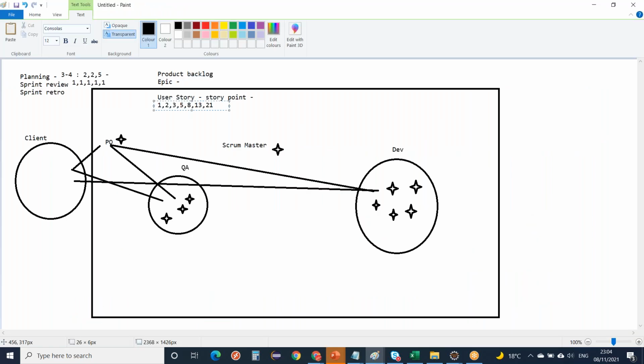That's it. So based on how much work we have with that user story, how complex it is, or how much more work we have, based on that we will be giving the story points. If one or two test cases, or a minimum of five, in that 1 to 5, we'll give a 1 pointer only. A 2 pointer is much more than that, around 20, around 30. If more than 30 test cases will come, then we'll give a 3 pointer, 5 pointer, like that. So there is no rule about the number of test cases.